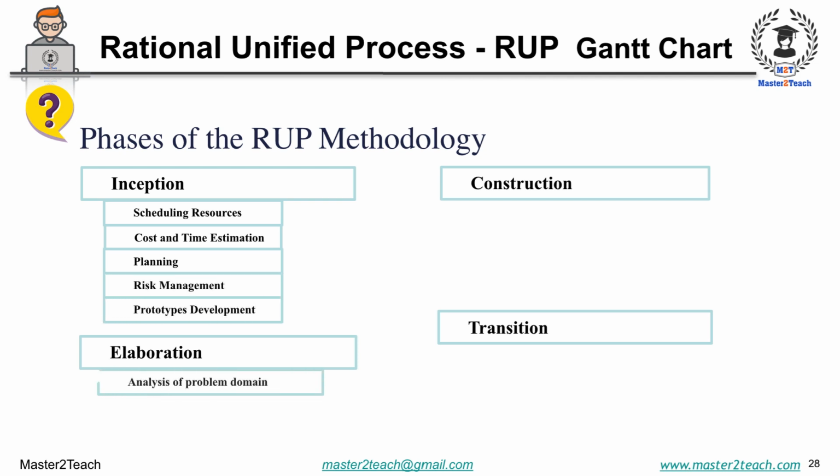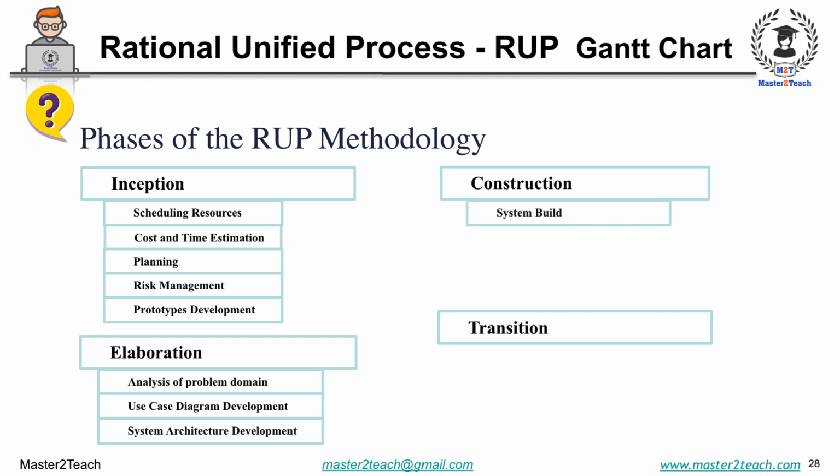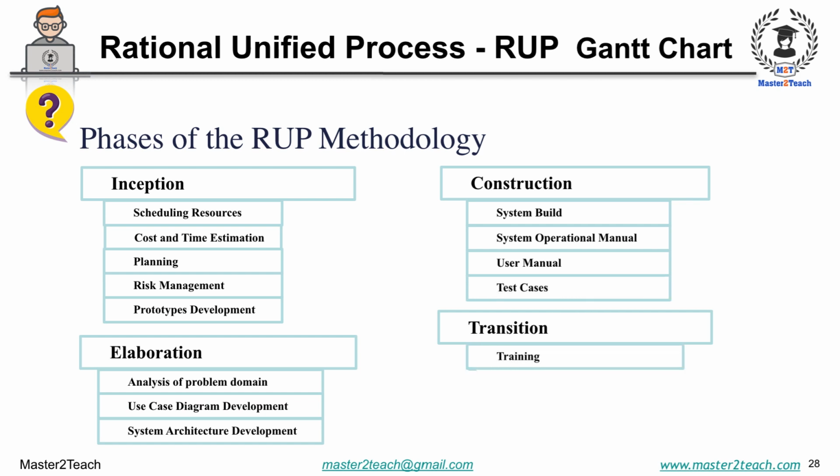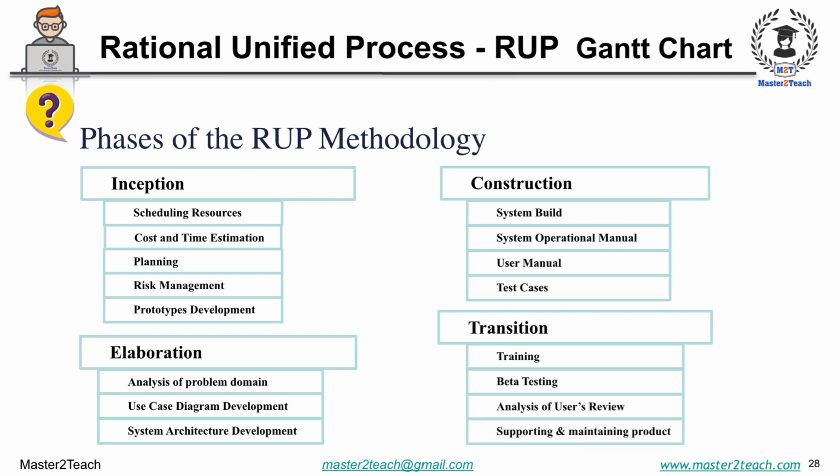In a team, some will be working on designing whereas developers are also developing the system. Of course, we know that we can't develop without system design, but in this methodology, we will not wait for the whole system design to be finalized. As one module's system design is finalized, the developer starts working while the designer starts to design the next module, so that there will be more overlap in the execution. In the waterfall, we start developing only after finalizing the whole system design.